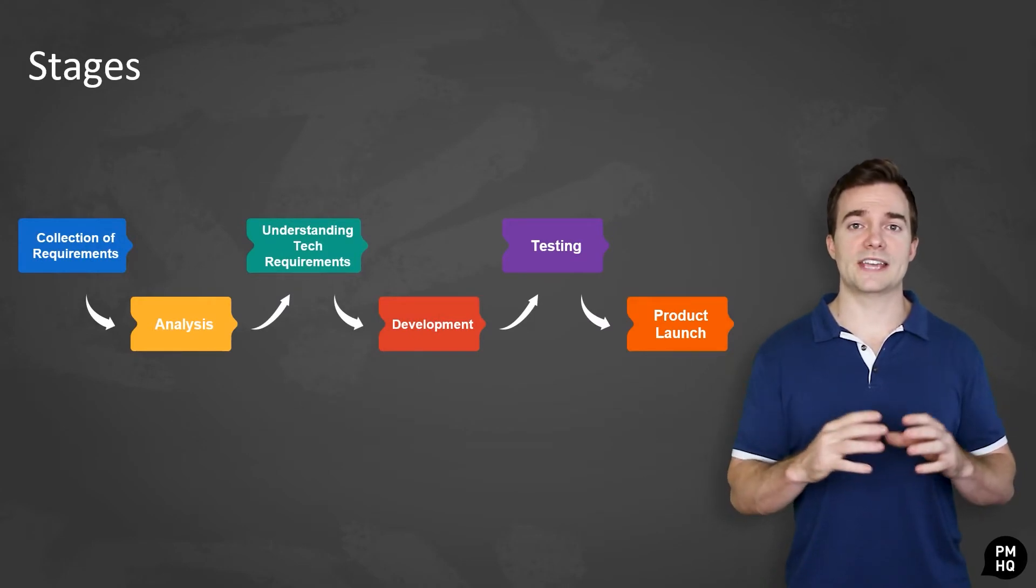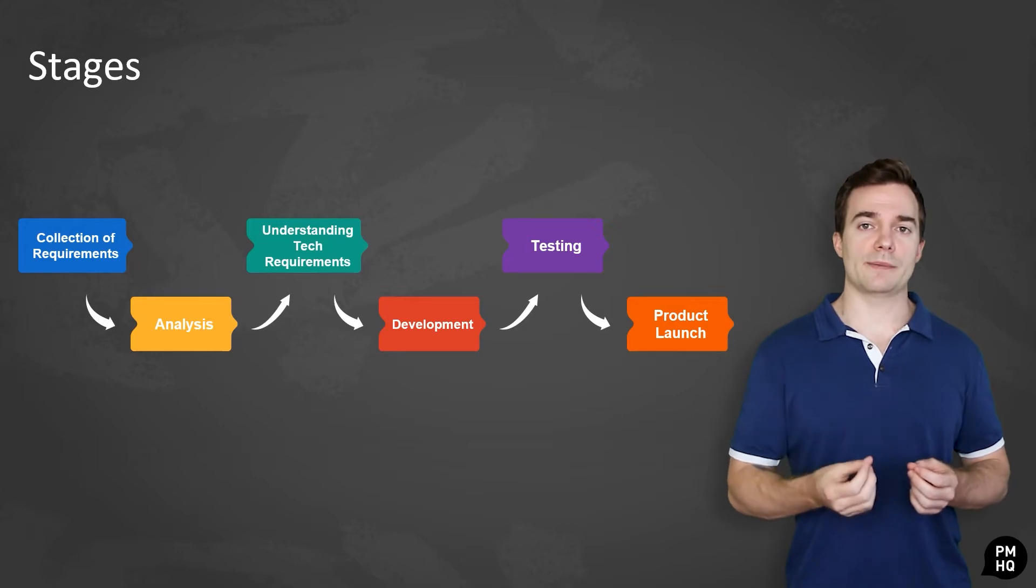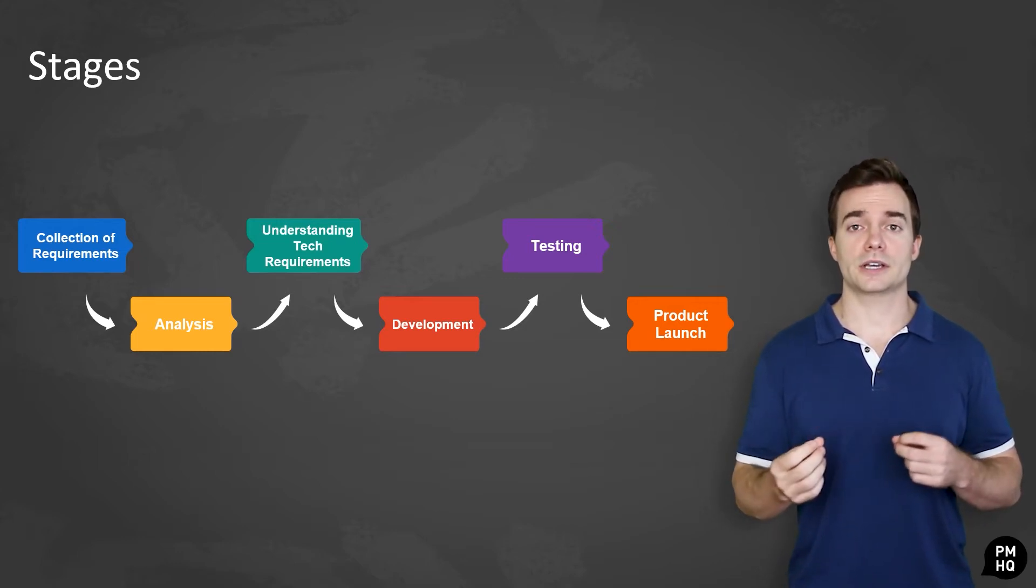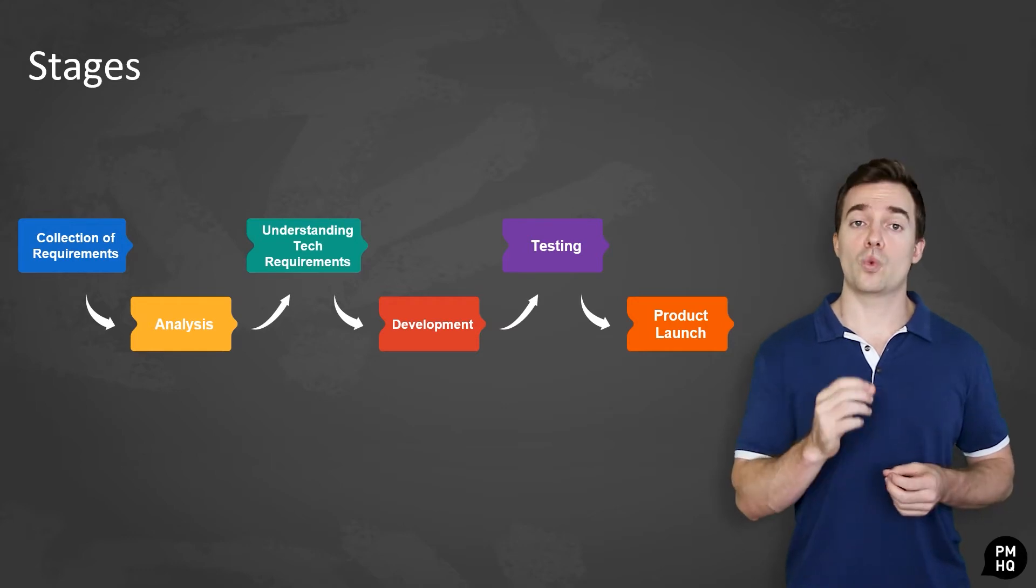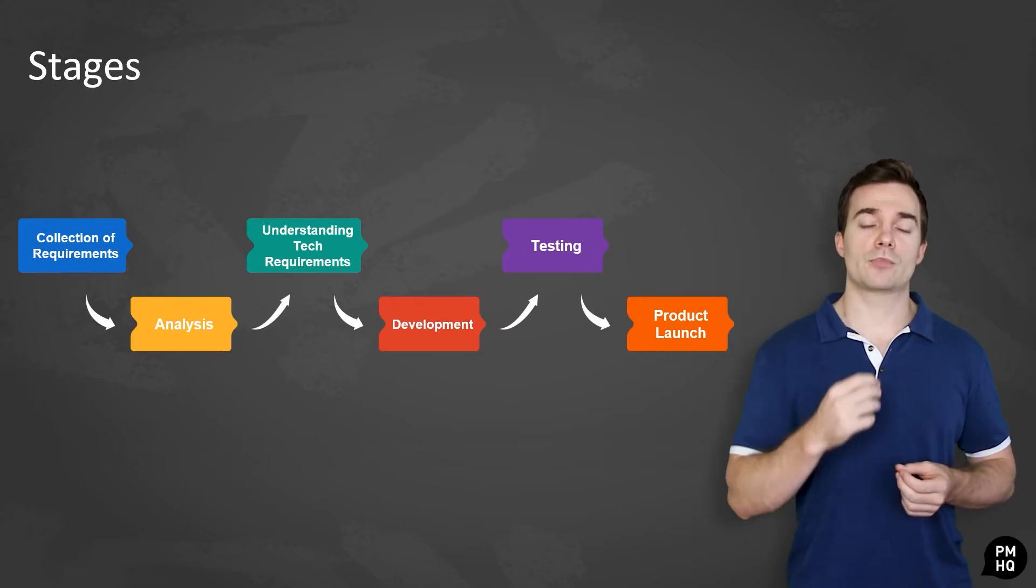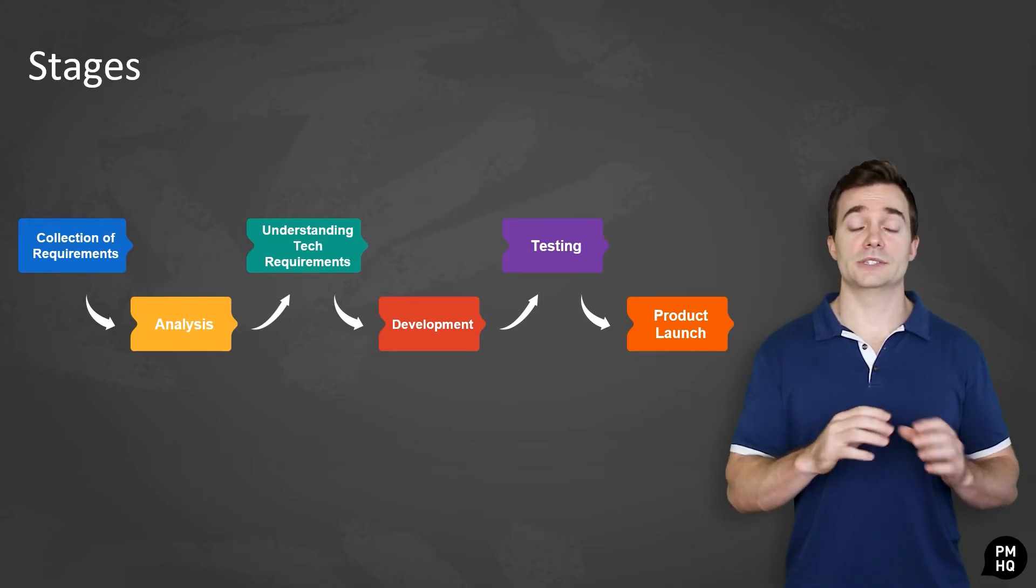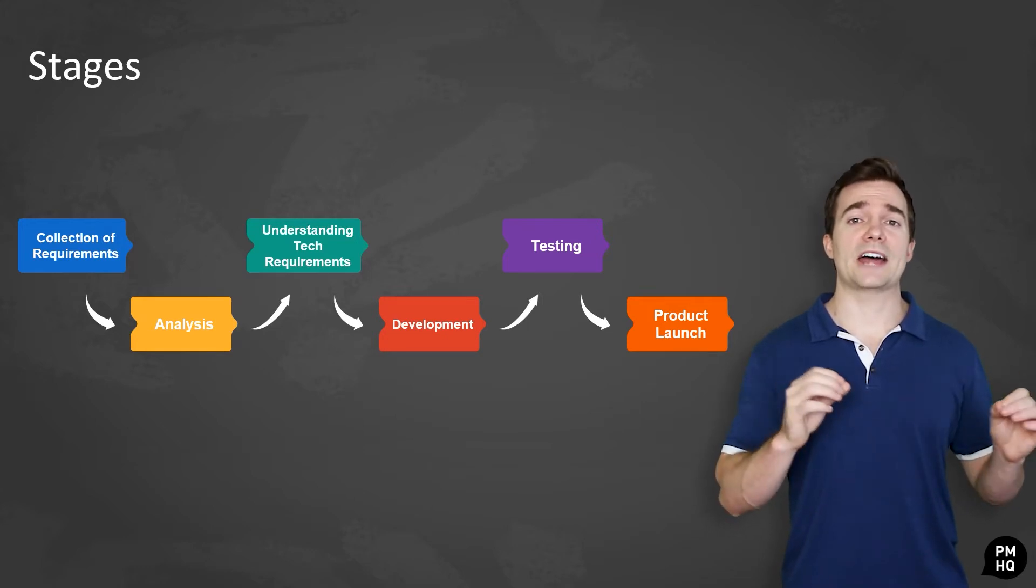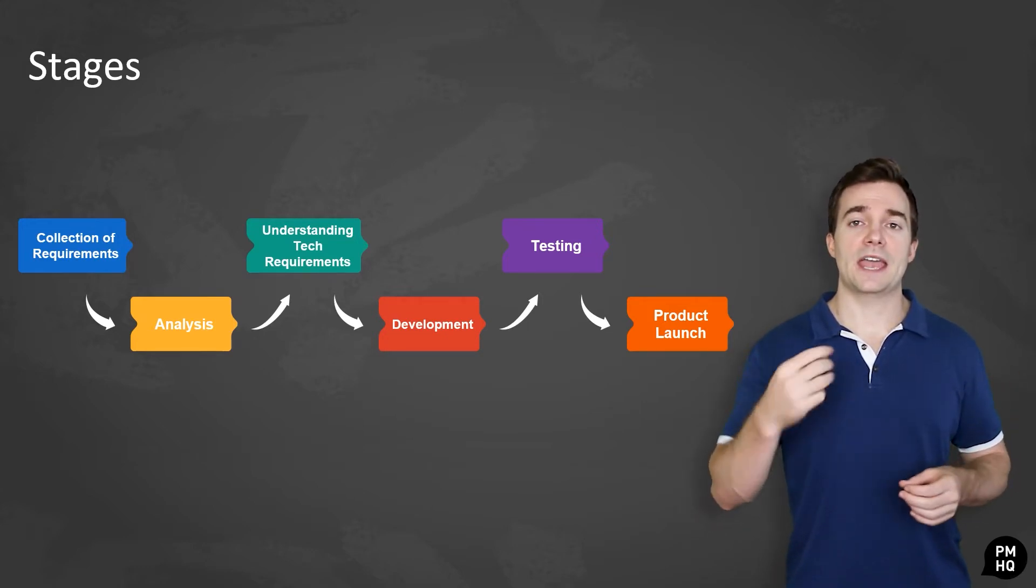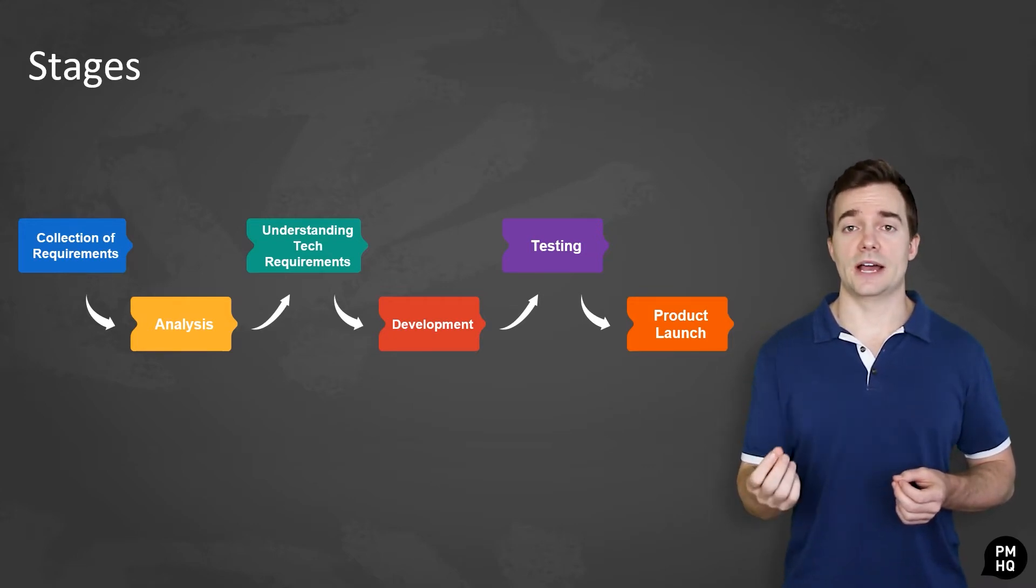In total, there are six steps of the waterfall model. The first one is gathering requirements. During this first phase, the potential requirements of the product are methodically collected and written down in a specification document. With this requirements document, project managers plan out every other phase without further customer correspondence until the product is complete. It is assumed that all the requirement gathering happens at this phase, and the requirements are gathered by the business analyst and analyzed.